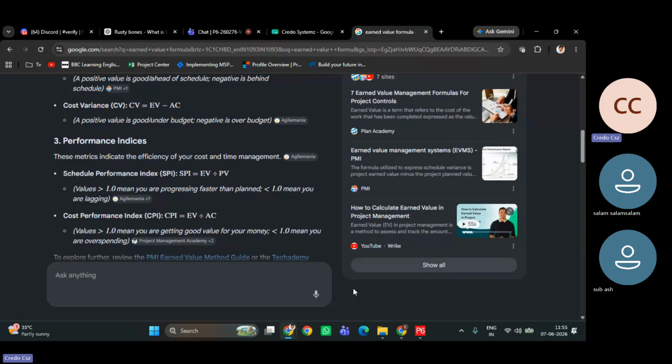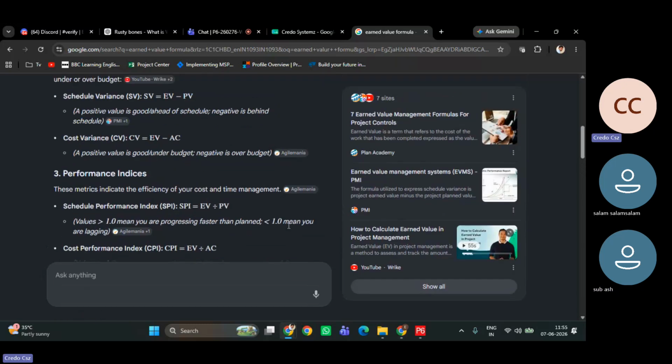Only risk you can do anytime. Even after making the baseline, you can do risk analysis and load a new risk. But when it comes to cost, resources, activities, duration, linkages, everything must be done before the baseline. So next time, try it before making the baseline. Okay, I will try; it will be helpful for another project.